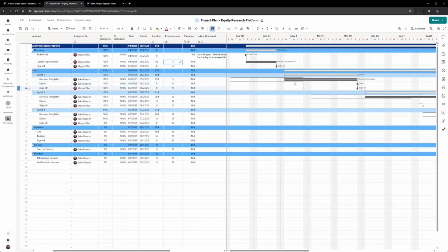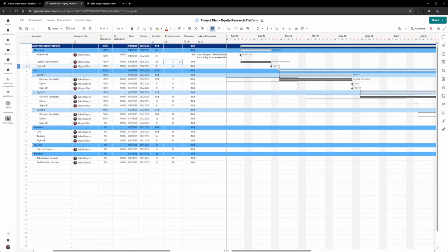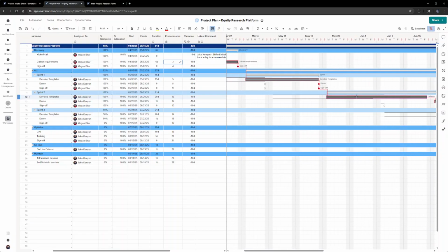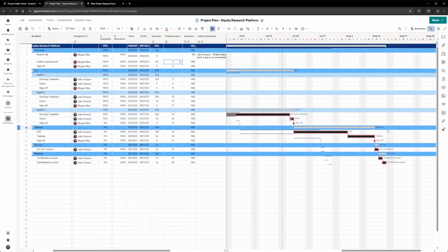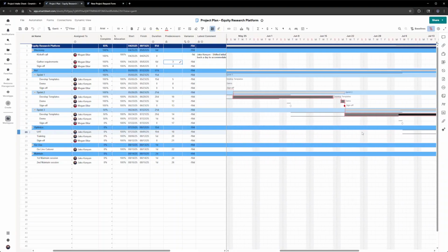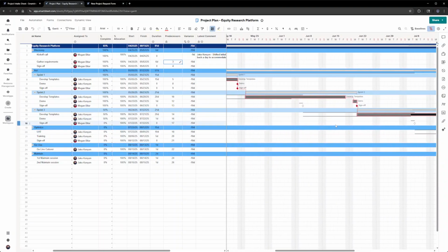And you can see that relationship over here using the Gantt chart with the little arrows, and you can also toggle critical path, which lets you see which tasks will actually push out your final end date based on your predecessor relationships, right? So just a nice, easy view to see kind of where you're at, what's going to impact things, right?